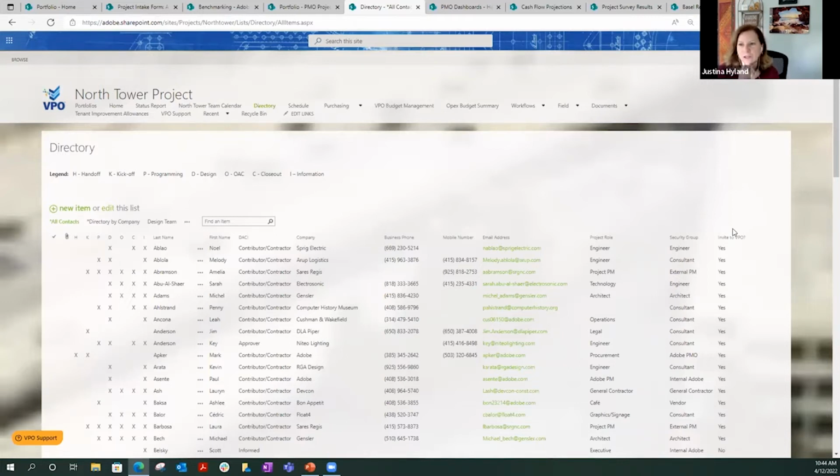What I learned over the years from other companies and teams similar to ours is that in all of our contracts, whether architectural or general contracting, we have a clause saying that this is the primary source of truth for the project, and that this is where all of the documentation for the project will reside. That was one thing we learned instantly, that we really had to start doing that.